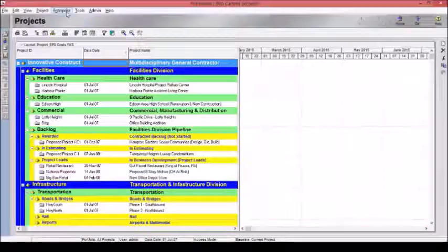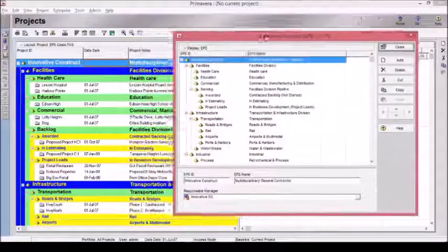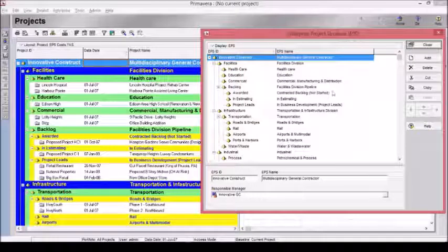So you will go here to Enterprise and choose Enterprise Project Structure. You see here, what you see in this pop-up is exactly what you see here, with the exception of these projects. These entries, these elements with the white backgrounds, are the projects here. So in this pop-up, you will not see the projects, but you will see the elements, the root node, the nodes and subnodes, exactly as here. So all this colored portion has been generated using this pop-up.